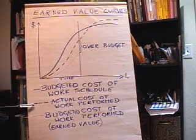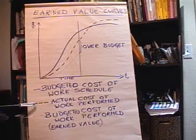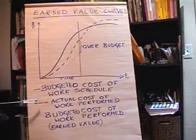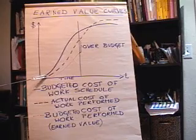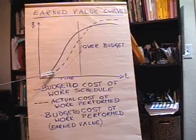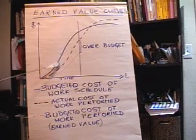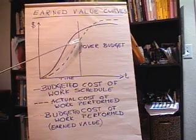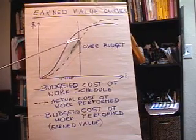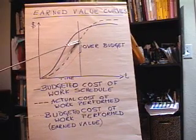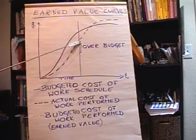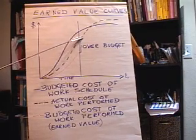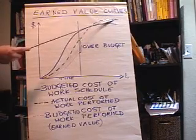The second curve, this dashed line, is the Actual Cost of Work Performed. This is actually how much we're spending over time. Notice that it's below the budget. As of today we've spent this much money on the project. If this continues — this is our projection — we're going to be over budget.